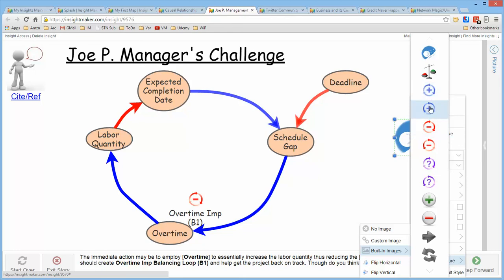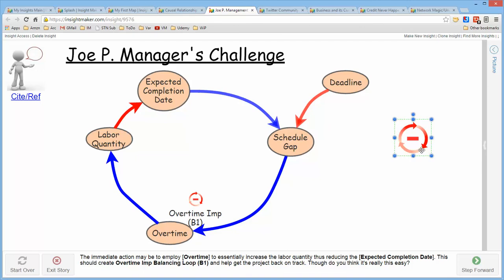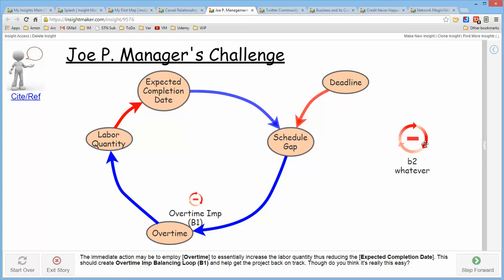InsightMaker provides clockwise and counterclockwise reinforcing indicators, clockwise and counterclockwise balancing indicators, and uncertain indicators for when you haven't quite figured out what the loop is. By selecting one, it replaces the placeholder, and then you can label it — B1, B2, and so on. All balancing loops are goal-seeking, so you want to label it in a way that conveys what the loop is doing. This particular loop is implementing overtime, and you sequence them so the reader knows how to read the model.